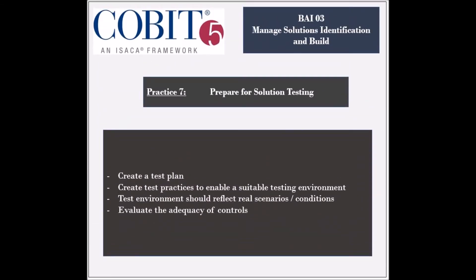The activities involved include creating a test plan that complies with the enterprise strategy to create a suitable testing environment. The purpose of testing is to verify that the solution will operate successfully in a live environment. The testing environment should be created reflecting real-world scenarios and conditions, and test procedures should be established facilitating the evaluation of the operation of the solution.